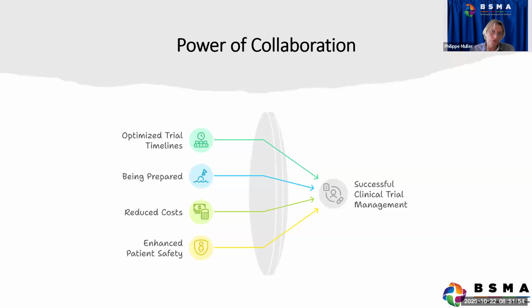But when you set your strategy, depending on the trial design, as was mentioned, maybe you consider central sourcing versus local sourcing, even with the countries involved in the trial. We have done that as an option, and then you can calculate the cost, you can calculate the risk as well. You have local sourcing with central sourcing, and then make a sound decision.